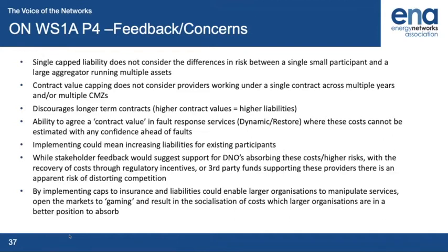So, of course, if we implement a 1-year contract, that contract value itself will be far, far lower than a 4-year contract for the same service. So actually the contract length has a direct impact on the contract value and therefore what liabilities and indemnities would be sought through the contract.